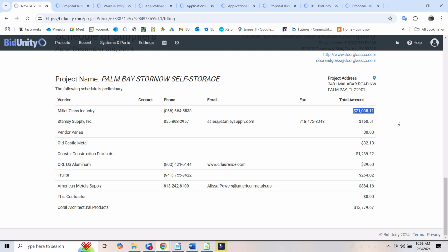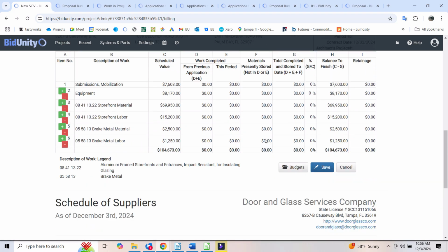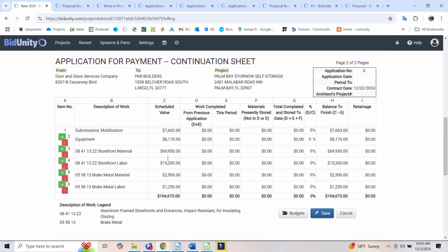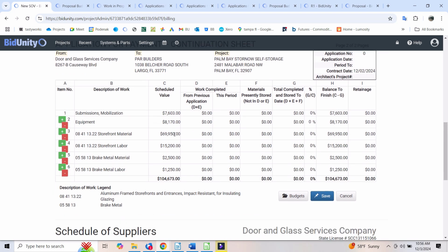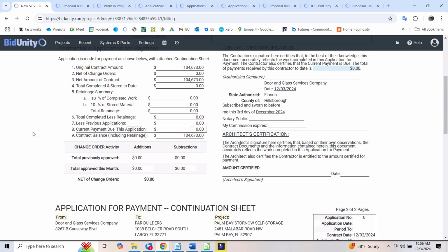This could be a nice thing to reference as you're making up the schedule values. So it looks like about 35,000 in the major material purchases, and our schedule, it's about double for material. I think that is going to give us cash flow about the best we could hope for, because we actually do have to do the work to get paid.